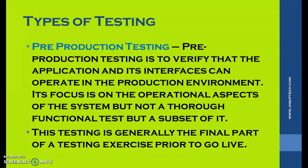Pre-production testing verifies that the application and its interfaces can operate in the production environment. Its focus is on operational aspects of the system rather than a thorough functional test — it is a subset of that. This testing is generally the final part of testing prior to go-live.